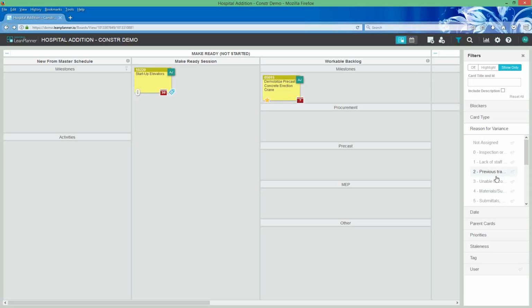How about the things that you mentioned to me last time about how the little calendar is red because it's past due and it becomes yellow when it's almost due, and so you get this nice visual if you're looking at your tasks about what's kind of hot. Can you also filter what's due, what's getting close to due, and that kind of thing? Absolutely. So you would say finish date is less than 7 days from now, and it's going to show you.